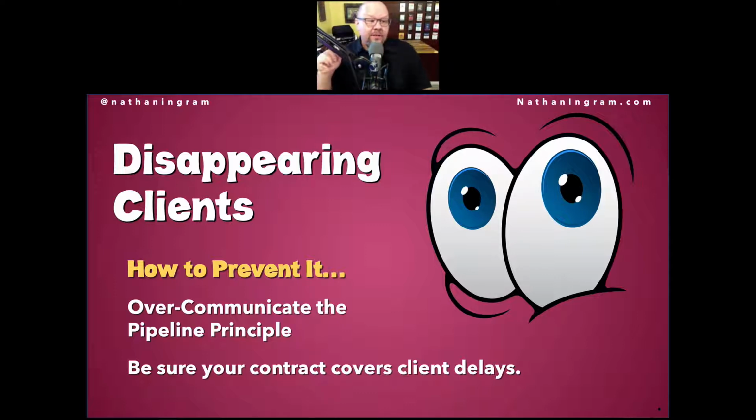The other thing you want to do is to make sure that your contract covers client delays. What happens if a client delays 3-6 months? Well, you need to have some good language in your contract to deal with that. What I do is I have a clause in my contract, like Melanie says, a suspended and abandoned clients clause that spells out exactly what happens if a client chooses to delay.